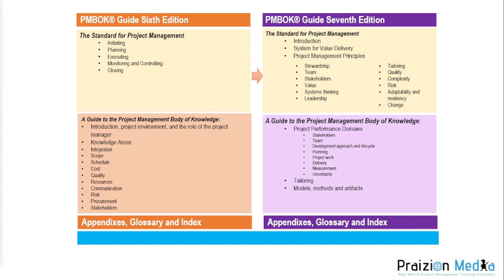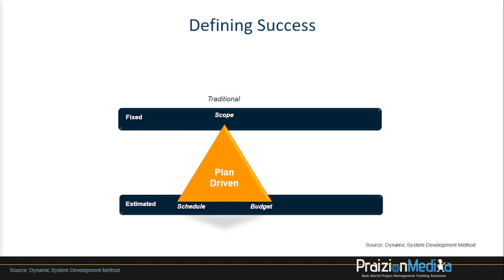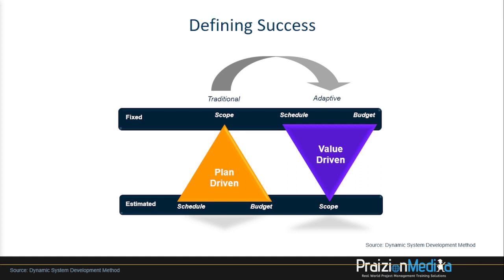Making a case for project management in general, you can look at it either from a traditional lens, where scope is fixed and schedule and budget are estimated or flexible, versus agile or adaptive, where schedule and budget are fixed and scope is flexible. In the PMBOK Guide 6th edition, there is actually more agile mention than in the 7th edition, because the 6th edition includes concepts, trends, tailoring, and considerations for agile at the beginning of every chapter. So agile is actually pretty solidly covered in the 6th edition.